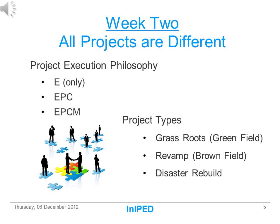Week 2: All projects are different, and it is important to know and understand the project. This is the time to look at the variations in how projects are executed. Project execution includes engineering only, engineering procurement and construction (EPC), and engineering procurement and construction management (EPCM). These are just the major variations in execution, but the PEL needs to know and understand them. We will also look at the different types of projects, including grass roots, revamp, or disaster rebuild, and why differences in requirements and execution methods apply to each.